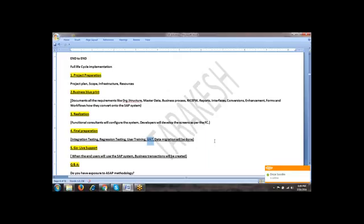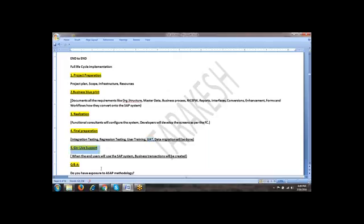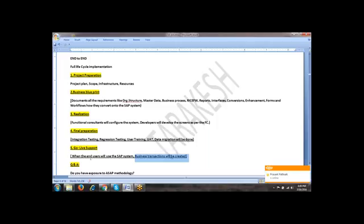Once UAT is passed, then all the configuration which is there in quality environment will be moved to production environment. Along with that, the data - Tata was using some Oracle or some legacy systems - a lot of data is there. The data will be migrated from legacy system into SAP system. Once the data is migrated, on the go live scheduled date, the end user of Tata Motors or the client people will start using the SAP system and will create the business transactions. That is what it is called go live. While creation of the end users, while creating the business transactions, the end users if they get any errors, then the functional support team will help the end users to resolve the issues. This is what it is called go live and support.